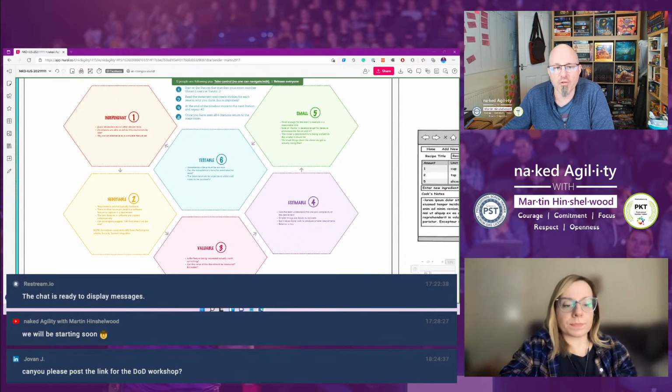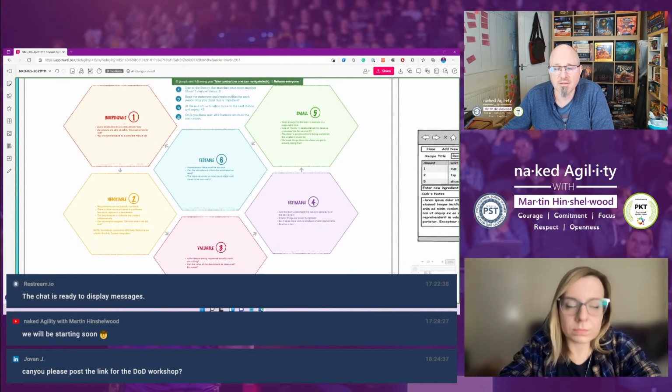And it needs to be independent, so we minimize dependencies. So if you do have dependencies, maybe it needs to be broken down into smaller things. And then the last one was valuable. If it's not valuable, don't build it. So understanding value is super important.